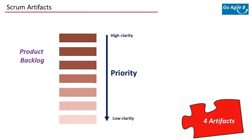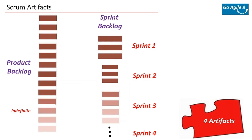The second artifact is the Sprint Backlog. The difference between product and sprint backlog is straightforward: the product backlog is the long list of open requirements, and the stories shortlisted to be developed in the current sprint form the sprint backlog. The sprint backlog is a subset of product backlog items selected for the current sprint — a forecast by the team about what functionality will be made available in the current increment.